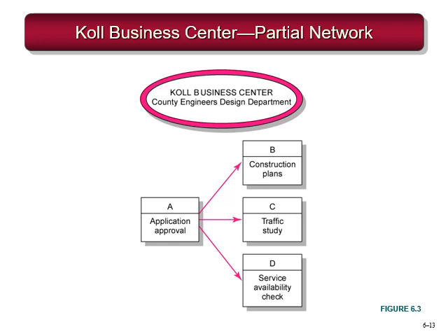So based on the previous information, B has A as its predecessor, similarly C and D. So from this network, what we understand is you have to complete A before you start B, C and D. And again, B, C and D are parallel activities. They can be done concurrently, but it is not necessary.